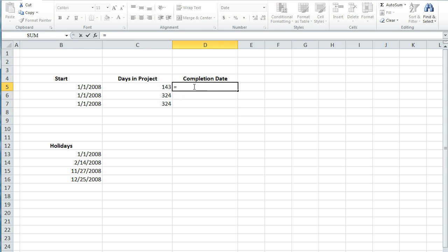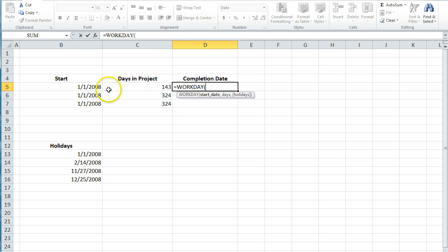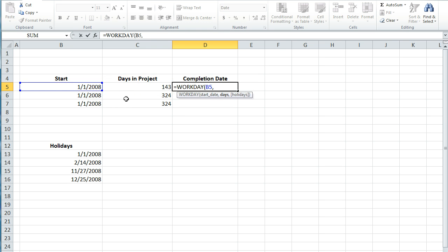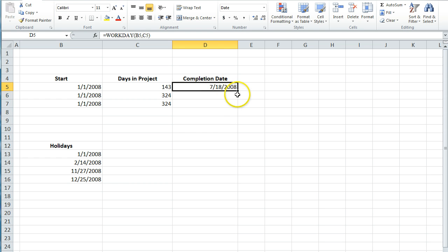So the formula is workday. So all you do is click on your start date, add in the number of days that it's going to take, and that will spit out your completion date.